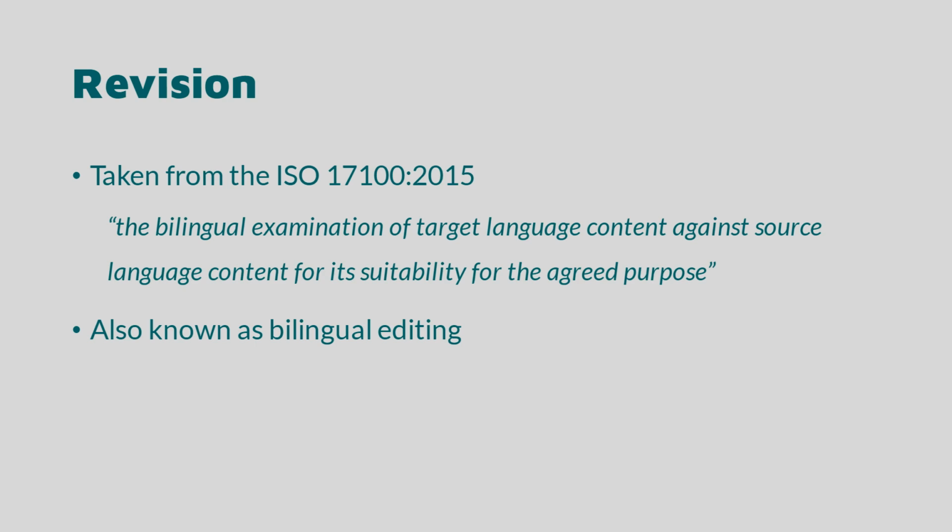The international standard stipulates that all target language content must be revised by a different translation professional to the one who originally translated it, and that this professional should hold the necessary qualifications in translation specified within the standard. The reviser should correct any errors found or make recommendations to the original translator for their correction.